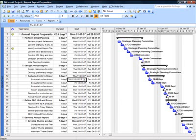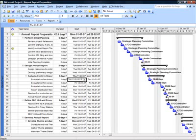In this video we will see how we can work with baseline. Once a project schedule is ready, it's very essential to save that project as a baseline. Project baseline will internally store five things: cost, work, duration, start date, and finish date.